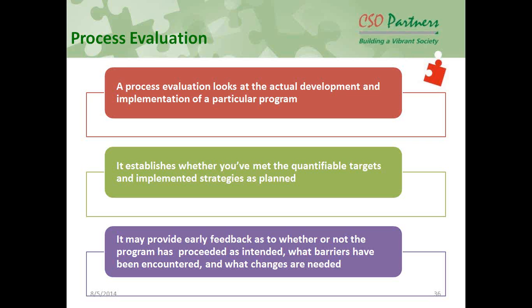That is why when you are doing the program planning, you should have a separate document, as even in our CSR Act, in the Companies Act, in the policy, you will have to give a monitoring and evaluation mechanism. That's a good provision, in fact. So ideally, when you are launching the program, you have the project document, you have the proposal of the program, you should have the monitoring and evaluation plan also in place. Yeah, with all the formats.